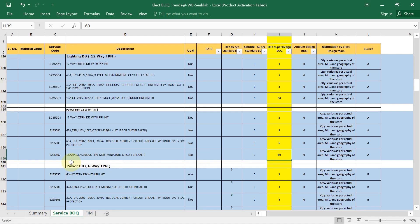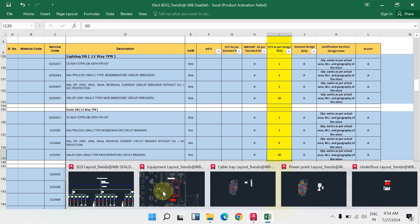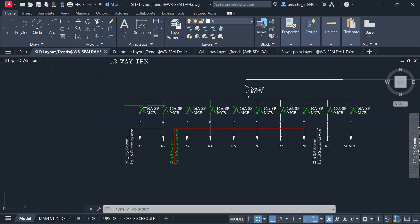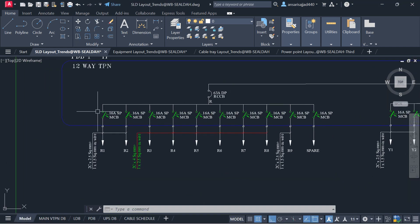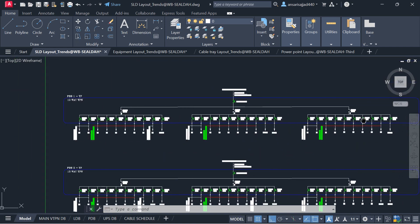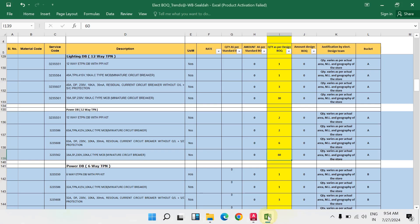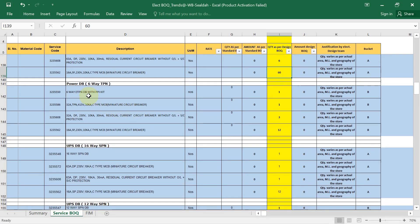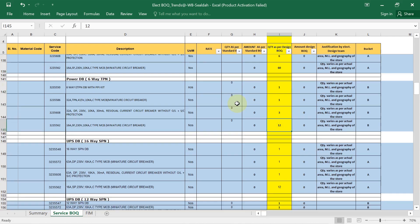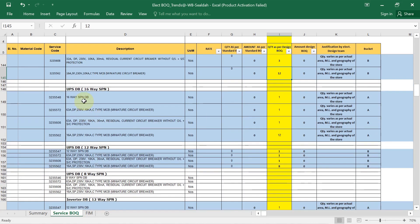For the 16-amp single pole MCB in the power DBs, total is 60: in each phase 10, so 10, 20, 30, 40, 50, 60 — I have written 60. Same way for the power DB 6-way TPN, fill in its quantities. Then we also have a UPS DB.